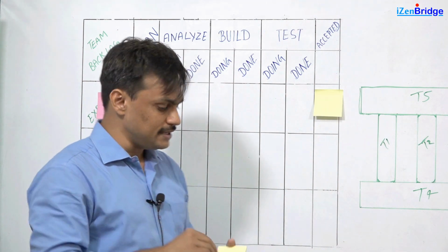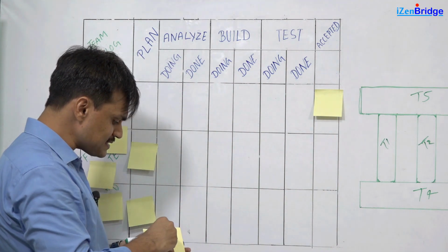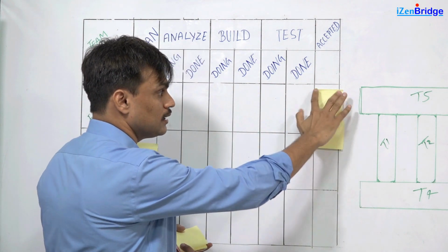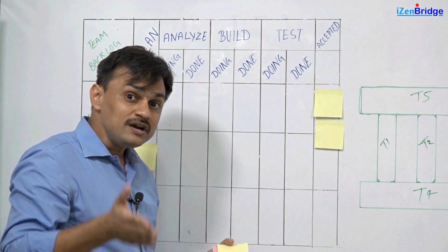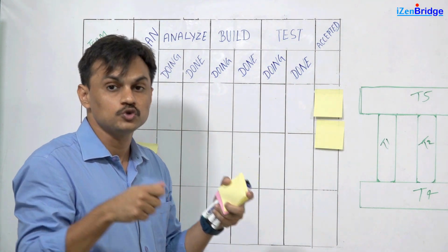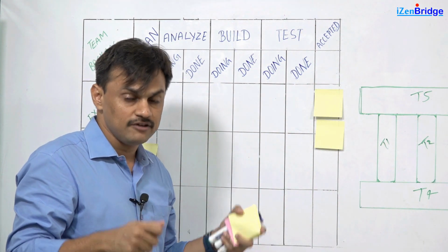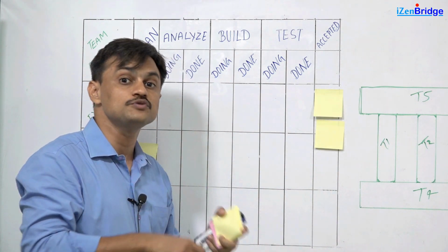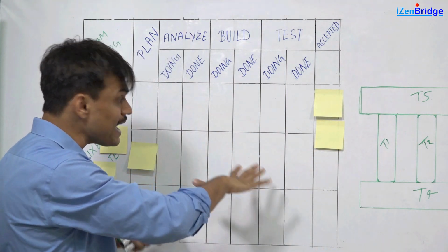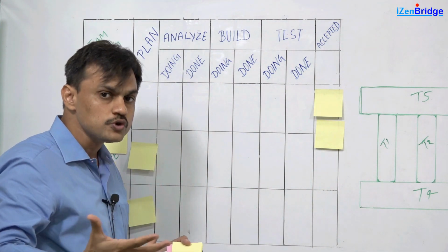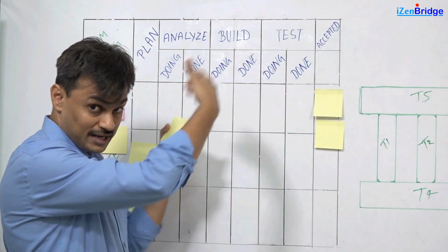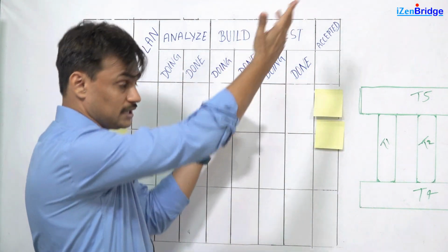In a Kanban team, you may have a work item which may get started on week 1 and it may finish on week 3 or week 4. So you don't have to split the items in two and make them fit into a 2 weeks sprint or 2 weeks iteration. The Scrum teams in SAFe will end up doing that. They will have all items which they start developing fit into the 2 weeks boundary. But the Kanban team may have that flexibility. They may not see a use of splitting unnecessary items to make them fit into 2 weeks. It can just keep flowing, and whenever it gets finished within the PI boundaries, it achieves its objective.